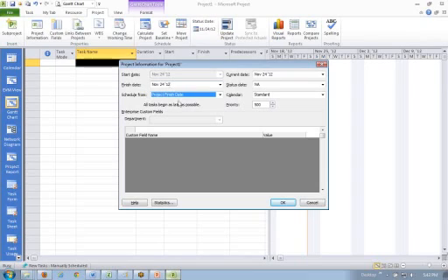I always recommend, whatsoever the situation is, however important the end date is, and whatever the pressure, you always go with the start date and work out a finish date. Maximum what will happen is that your finish date may not match with the customer's finish date. At that time, we will use some optimization techniques to match those things.